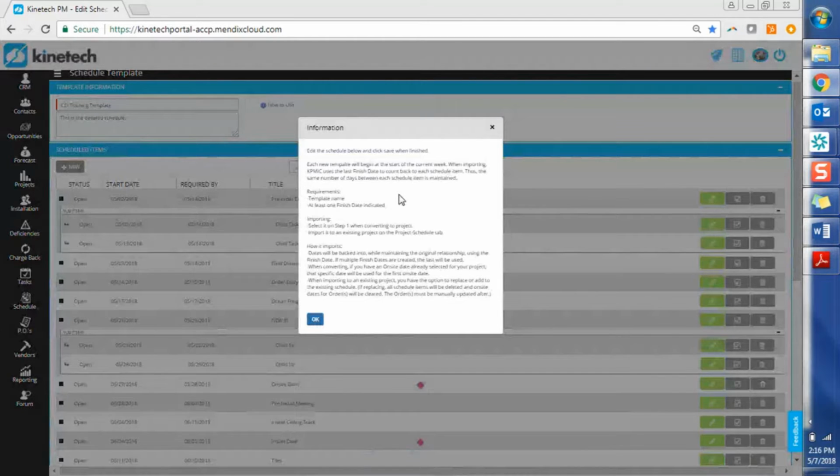if you had something that you wanted to put like as warranty, whether that be 6 months or 2 years out, whatever that is for you, you really want to base your schedule on actually when you're going to hand over the keys. That's that finish date versus something that might be a lot further out. So you don't have to go way further out in the future to let everything get backed into.